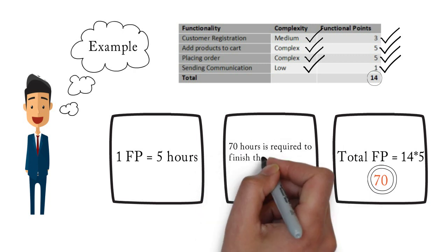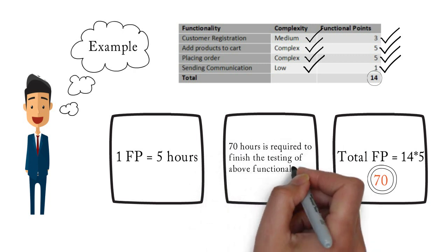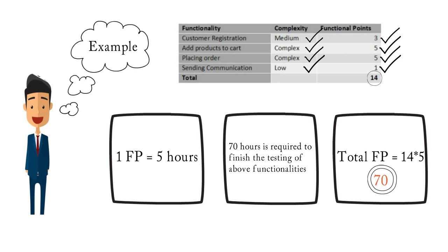The final step is to find out the total effort. We have total functional points of 14 and time required to complete one functional point is 5 hours. Multiplying 14 by 5 gives us 70 hours required to complete the activities of all four functionalities. The steps in functional point analysis are: deriving complexity for the task, giving functional points based on complexity, finding total functional points, deriving effort per functional point, and finding total effort.